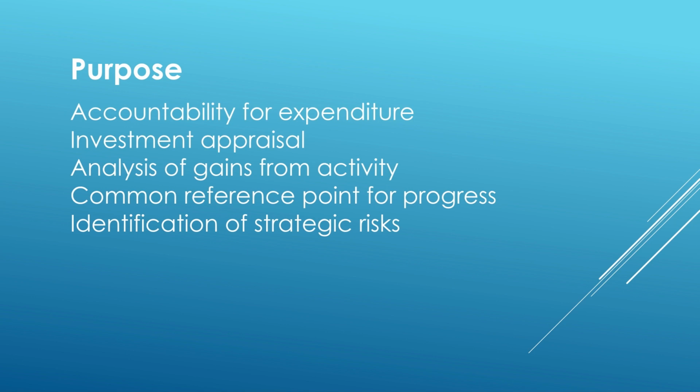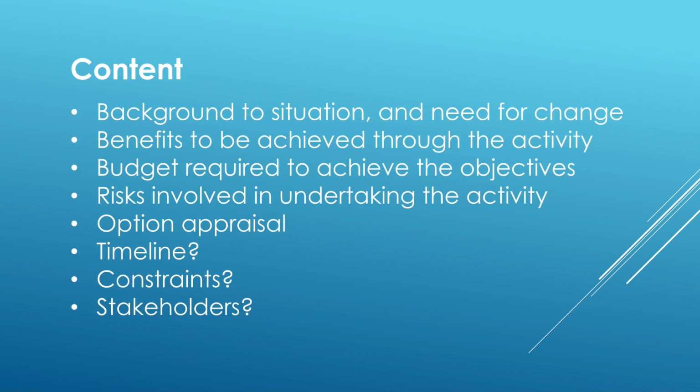So the benefit to the organisation of doing that is to remain compliant with a new law coming in. It's not to introduce new sales or market share or to improve processes necessarily to save time. It's about staying compliant. So the strategic risk of not completing that project was opening the organisation up to legal activities, to fines and things like this.